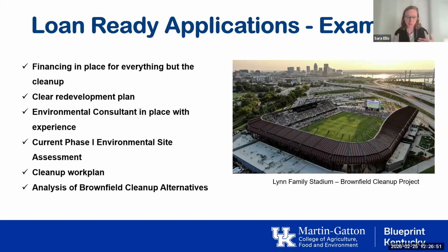And then just a final piece on that, the ABCA or analysis of brownfield cleanup alternatives would be another document we're looking for to say, okay, they've looked at what their cleanup options are, they've got a plan in place, they've got an environmental professional who's ready to carry out the work. Let's move forward.